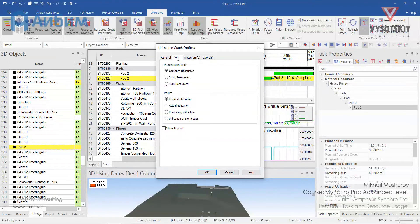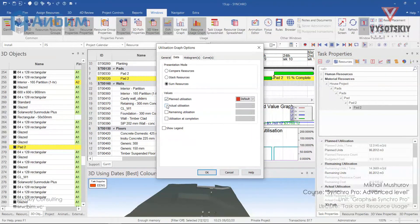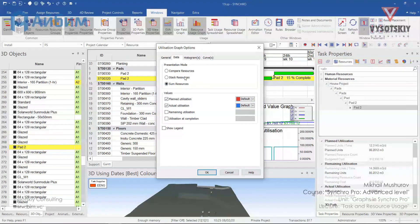We would like to track selected tasks and see all resources by type, and let's display the material resource usage. On the data tab, let's set the presentation mode as sum and display planned utilization and actual utilization in the default colors. This will generate a histogram and curve.